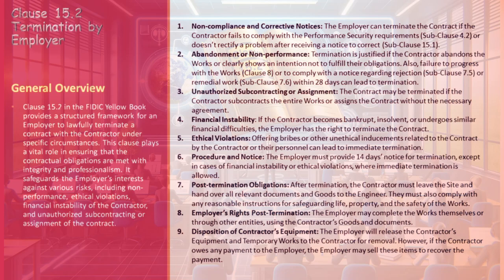Non-compliance and Corrective Notices: The employer has the right to terminate the contract if the contractor fails to meet the performance security requirements as outlined in Sub-Clause 4.2. Failure to rectify issues after receiving a corrective notice under Sub-Clause 15.1 also constitutes grounds for termination.